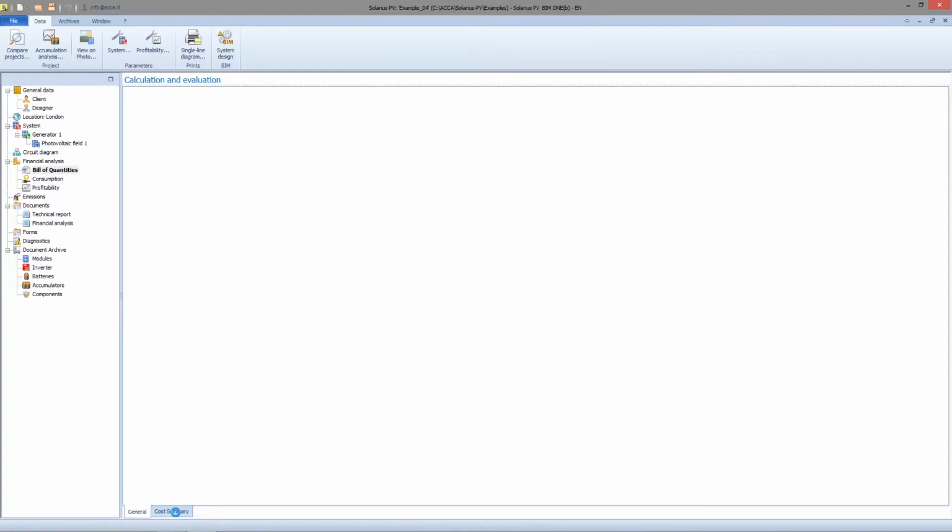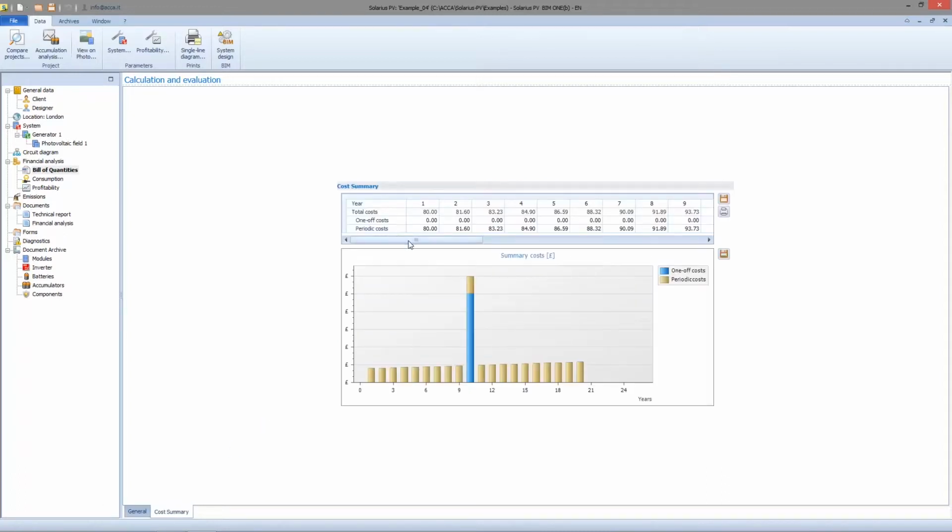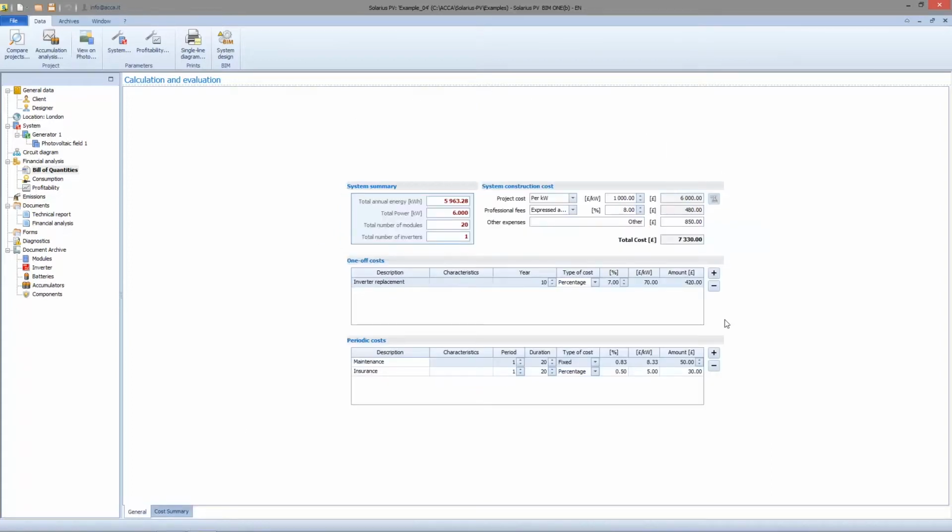Everything we do here in this mask, we find in this other window, in cost simulation, in graphical form, as you see, and also in tabular form, that could be exported as an image file or XLS, PDF or other formats. I can also calculate the plant properly as a common calculation of cost. So I can do a quantification of all objects present. So instead of using a kilowatt estimation, I can use a lump sum calculation.